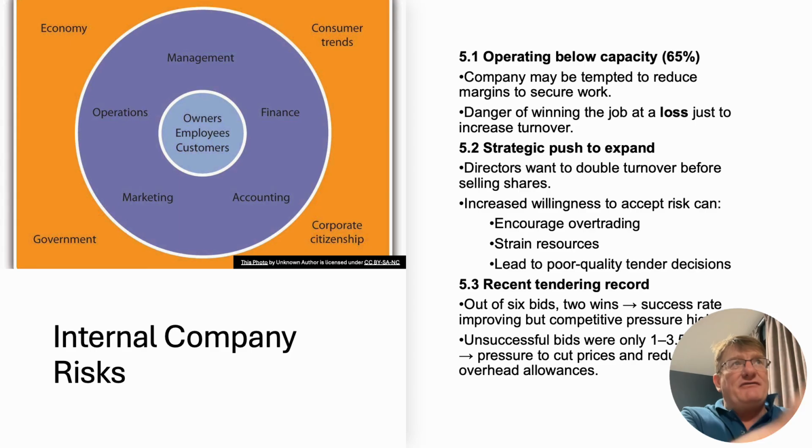Anyway, what I'm trying to say there is, again, it's asking you to analyse, to evaluate why there is this difference. When you go through the RIBA plan of work, you might start off with a cost estimate based on functional floor area. You might start on a cost estimate based on GIFA, gross internal floor area, or GFA as it's called now. Yes, follow the rules in the NRM1. Makes it as accurate as you can be at that particular time.